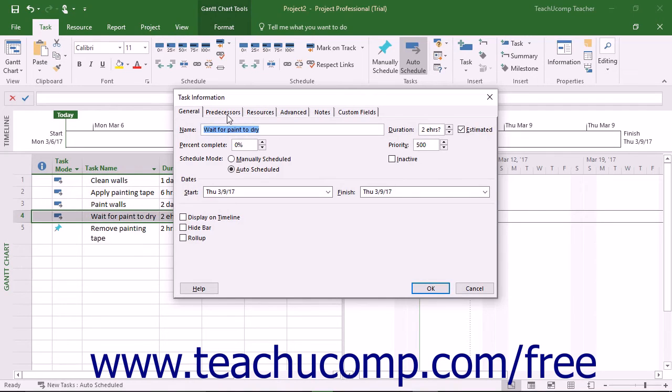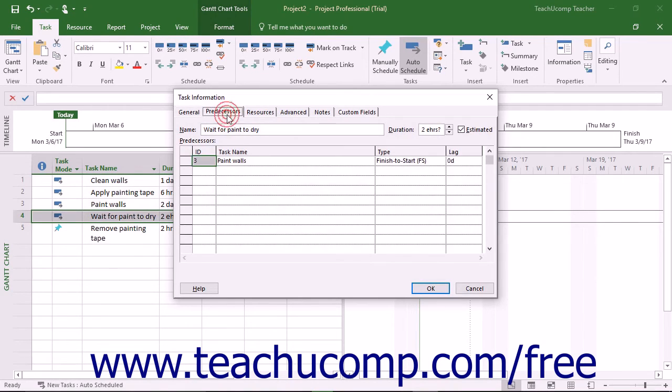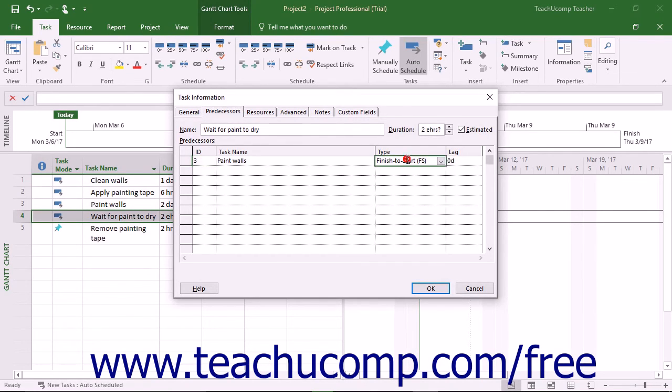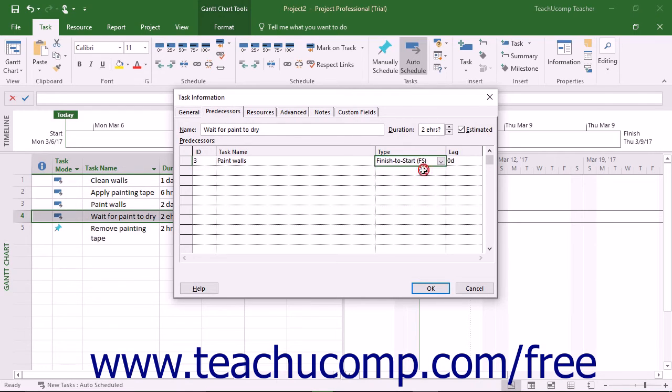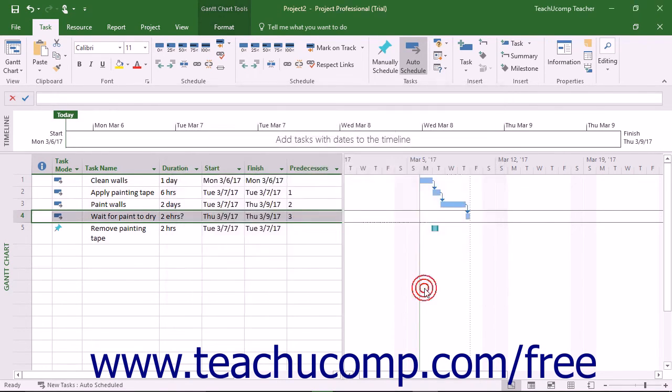In this dialog box, click the Predecessors tab to see the task's predecessor tasks and the type of link the two tasks share. Click into the Type column of the desired predecessor task and then select the type of task link to apply from the drop-down menu of choices. Then click the OK button in the Task Information dialog box to save your changes.